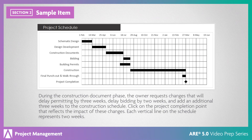During the construction document phase, the owner requests changes that will delay permitting by three weeks, delay bidding by two weeks, and add an additional three weeks to the construction schedule. Click on the project completion point that reflects the impact of these changes. Each vertical line on the schedule represents two weeks. The correct answer is a six-week delay.